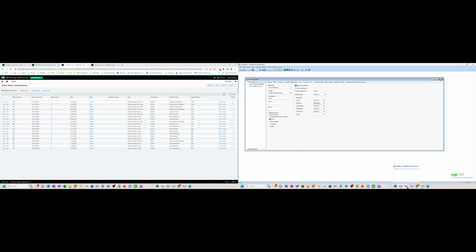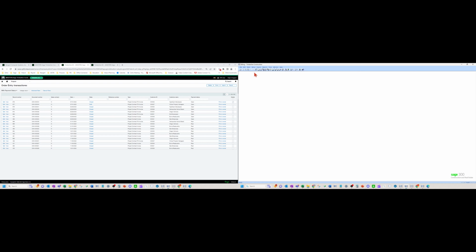So the other thing I would say when you're doing billing, if you do change the rate table, well, at that time, for that specific scenario, you do need to regenerate WIP so it recalcs it correctly. Again, it's not on the fly at all, like you can over in Intacct. Sometimes that doesn't work and you have to go generate WIP and regenerate and change. So this part can get a little hairy in Sage 300, okay?